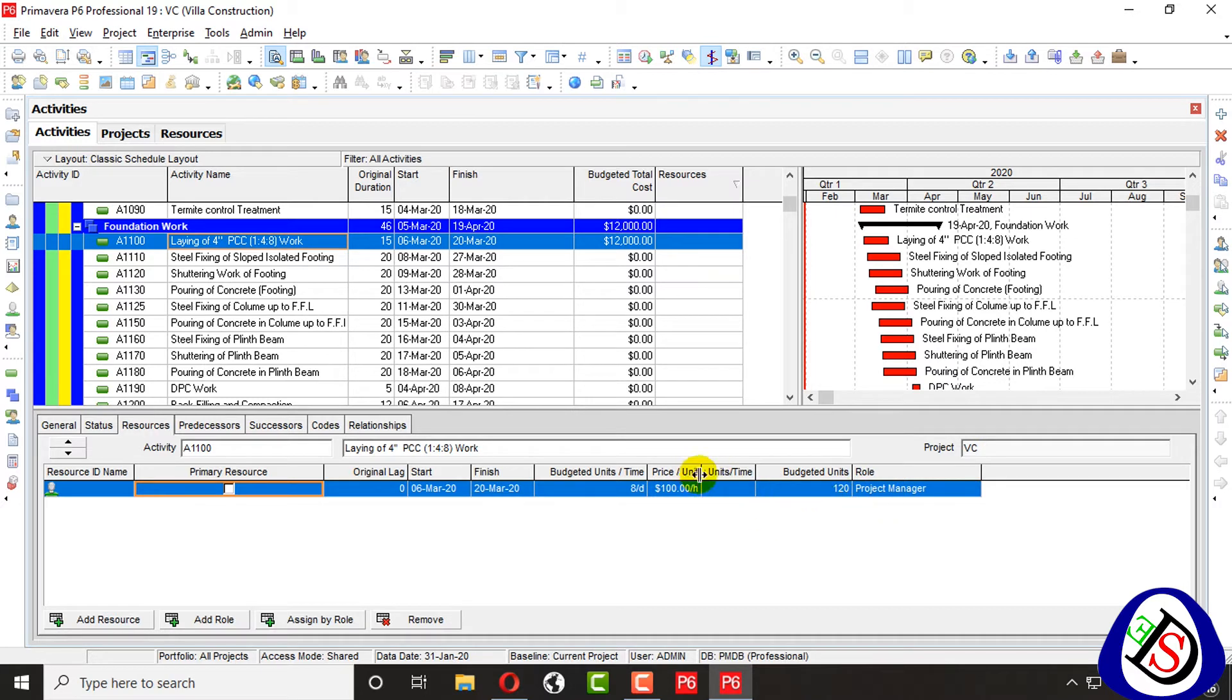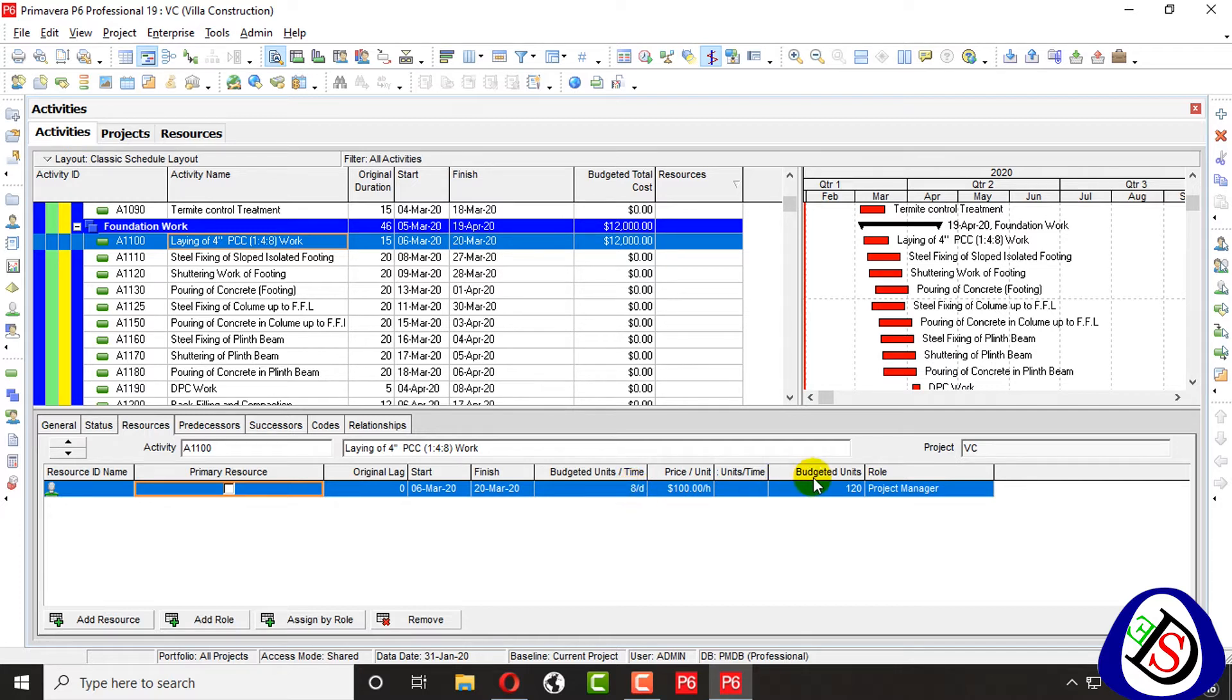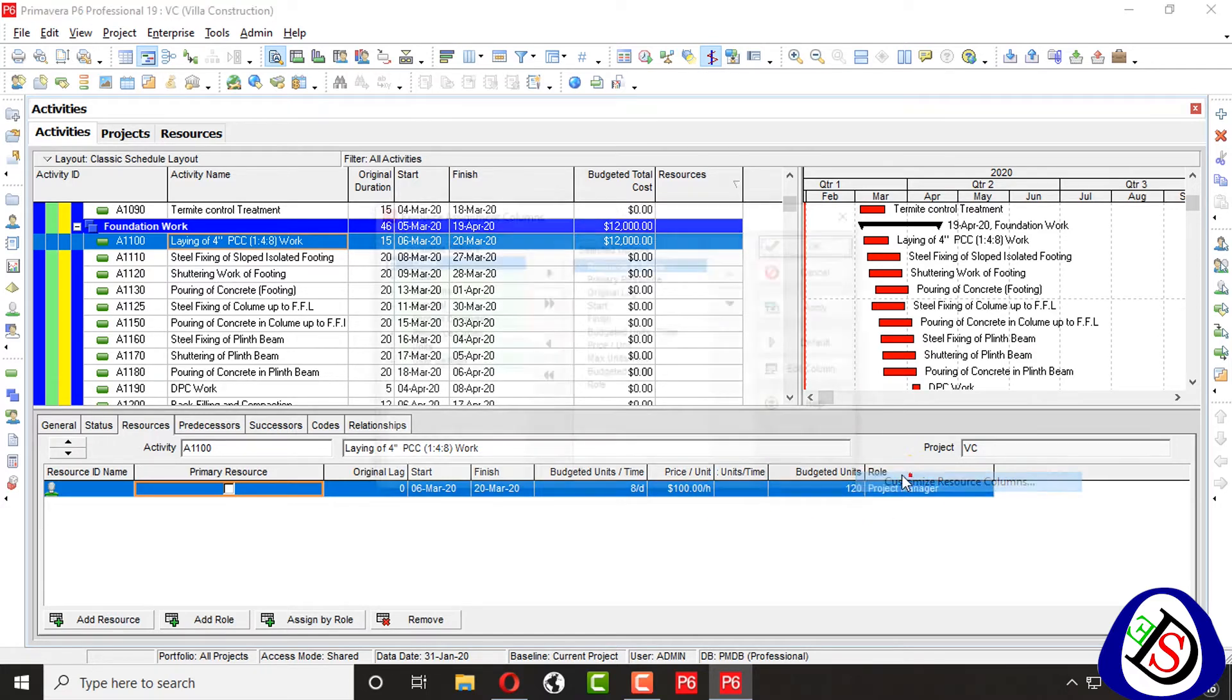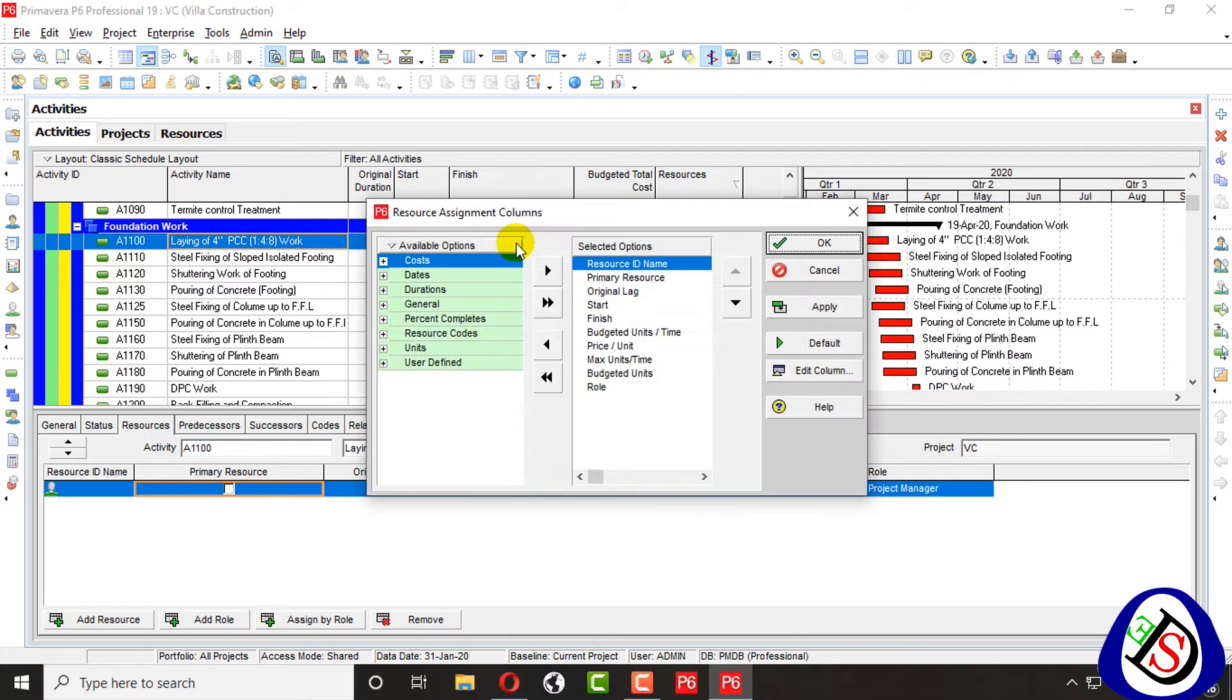So $100 per hour, eight hours he will work, and total budgeted units is 120. Means total budgeted units are 120 and 120 into 100 total budgeted cost.